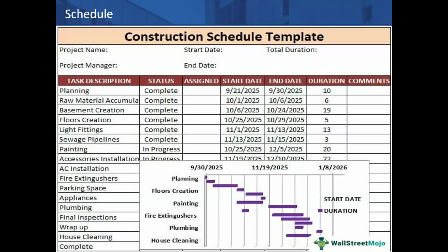There's all different types of schedules. Most schedules are some sort of task, start date, end date. They might have predecessors or prerequisites where you can't do sheetrock until your fire caulking's done. So we'll look at that when we analyze schedules, and a great super knows that's how you advance a project, is they're really, really up on all those different pieces.